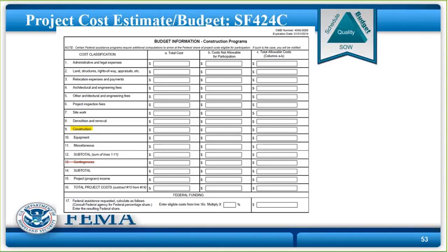That's all really good in that detailed engineer's cost estimate that you're probably going to get from your engineer, and you're going to attach it into eGrants, but it doesn't go into the eGrants cost line item budget. What you use to input data into the eGrants cost line item budget are these line items, and then you attach your detailed budget to eGrants. Let me tell you, it just works so much better. It's so much easier to administer, because guess what?